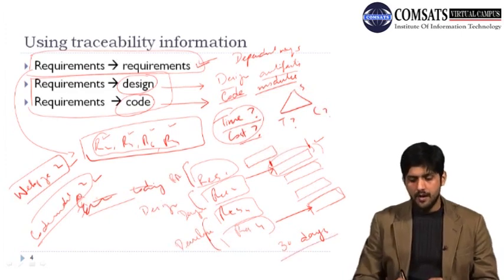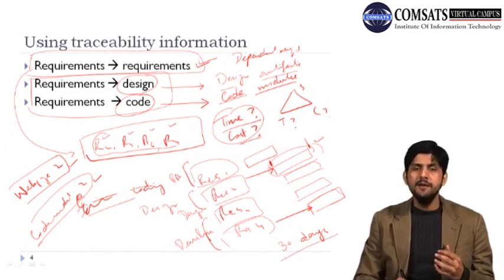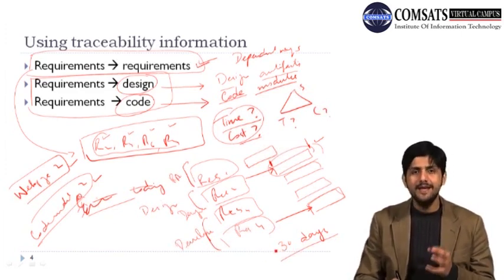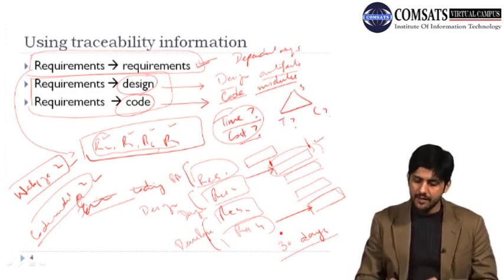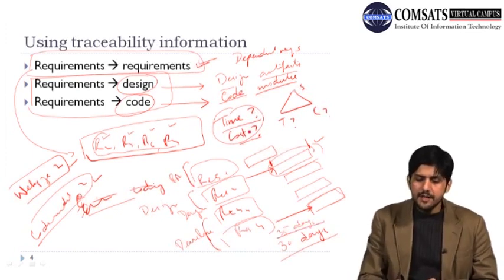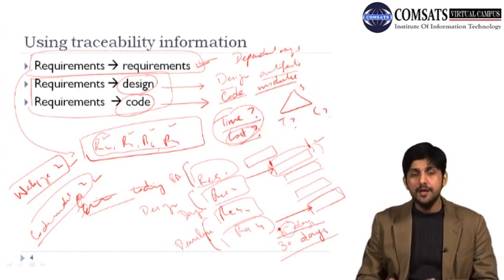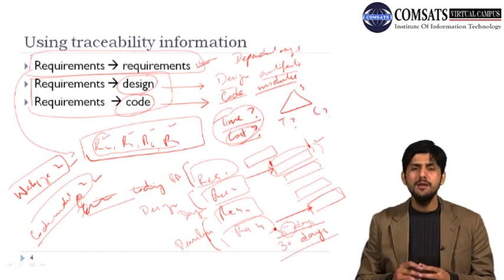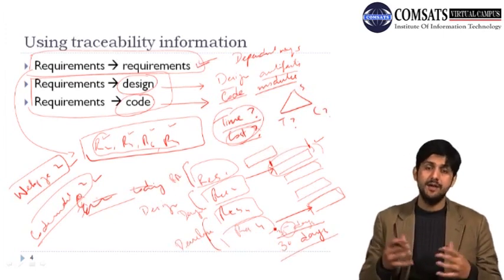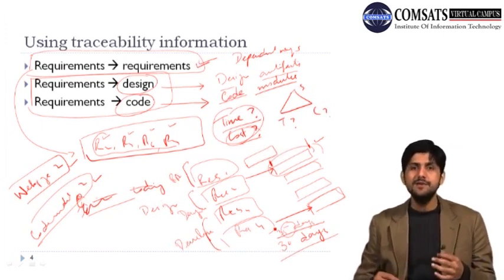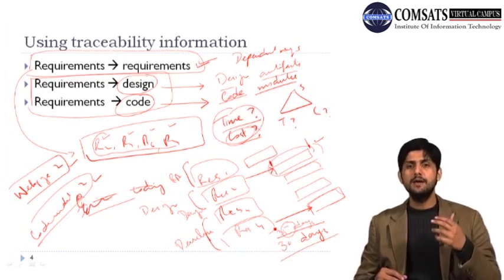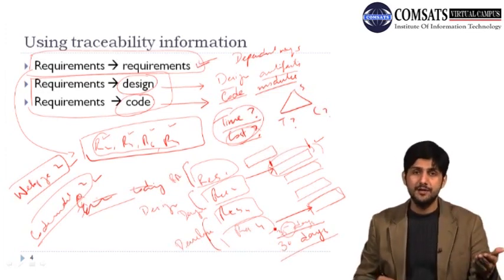Okay. A very simple way of calculating this impact analysis is to just calculate the delay in the project. So for example, let's say we identify that the project is going to now finish in 35 days, then we do not actually need to worry about this costing. Because our project is going to take 5 more days, we can determine the additional cost as well, because 5 more days would mean that we are going to pay salaries of 5 more days to our resources.